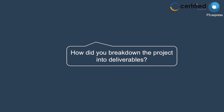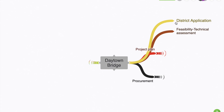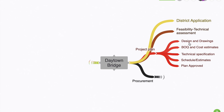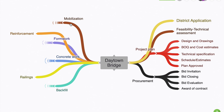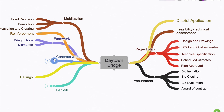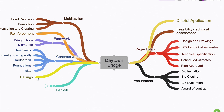Henry broke the project down into deliverables: the district application, a feasibility technical assessment, the project plan layout, procurement deliverables, mobilization, three levels of reinforcement, formwork for the bridge, concrete work, railings, and finally backfill. The majority of these deliverables will have specifications documented defining what should be produced to get each signed off.